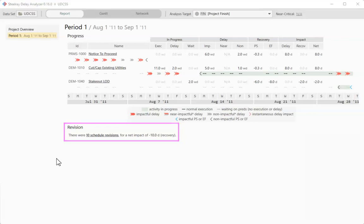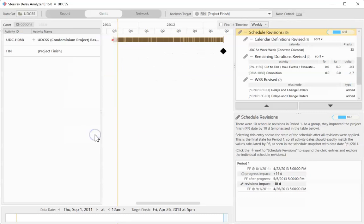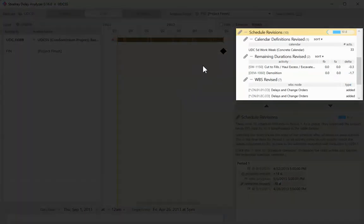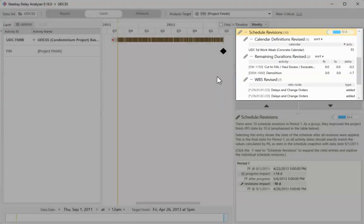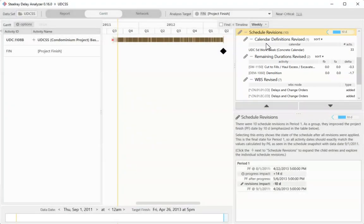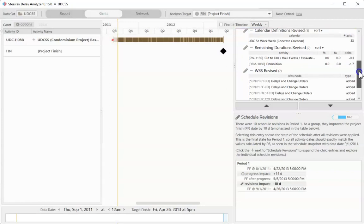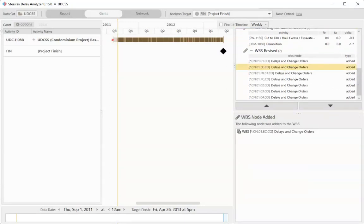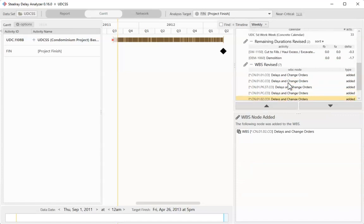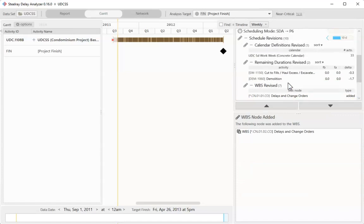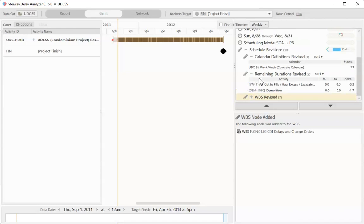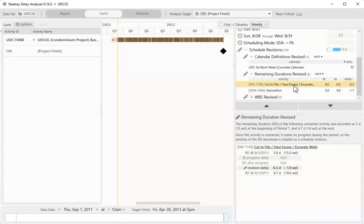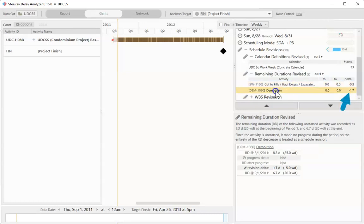I'll click on the link at the bottom to see a list of revisions in this period. Looking at the timeline, we break down the revisions for you into three groups. Working from the bottom up, I can see that some WBS entries were added, but those sections themselves wouldn't cause any kind of recovery. Next, we have some remaining duration changes, and I can see that those may have contributed to the 10-day recovery, but those changes were pretty minimal. Looks like they may have only recovered a day or two at most.